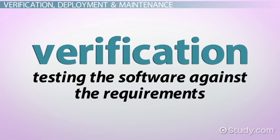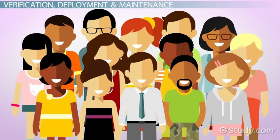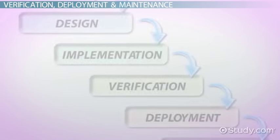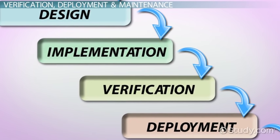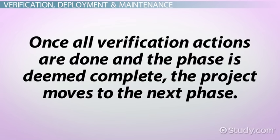The verification phase is testing the software against the requirements. During this phase, the project team may select a pilot group of users to test the software's user-friendliness or to provide user feedback. If the software does not meet the requirements in the requirements document, it is sent back to the software engineers for further implementation. Once all verification actions are done and the phase is deemed complete, the project moves to the next phase.